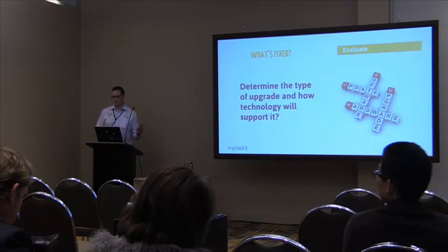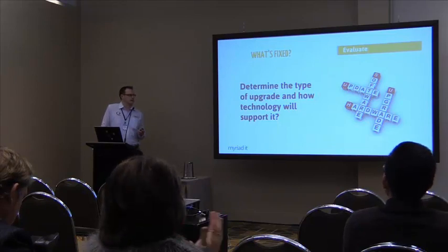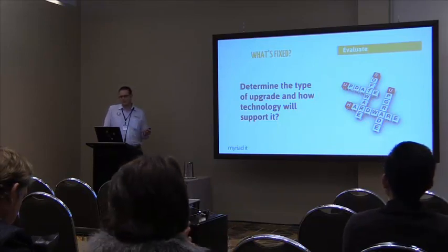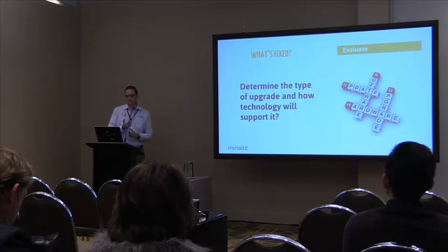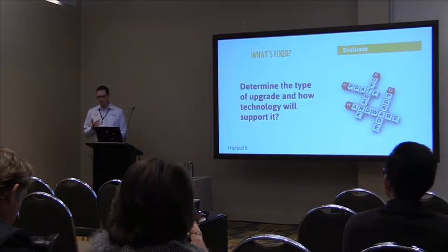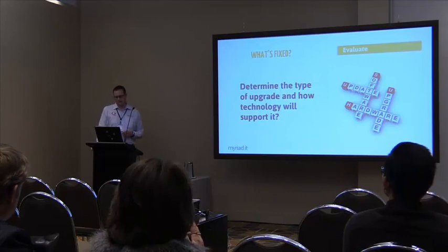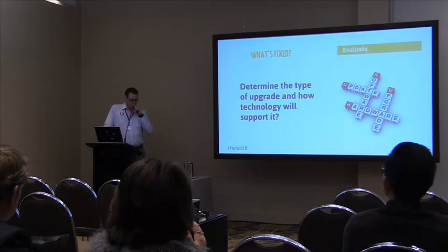What you can do is an evaluation process at the start. Roughly, you're looking at maybe 10 to 15K to set that up. This allows you to put together a solid scope so you know exactly what's going to be involved in counteracting those 5 major obstacles that we identified earlier. So you'll know how much retrofitting I've got to do, what training I'm going to do, what testing I'm going to do. Once you've got those, you can start building your business case to then roll into the upgrade.